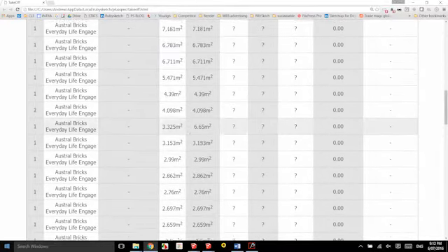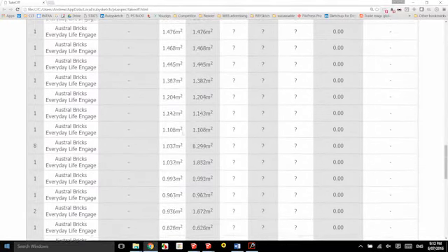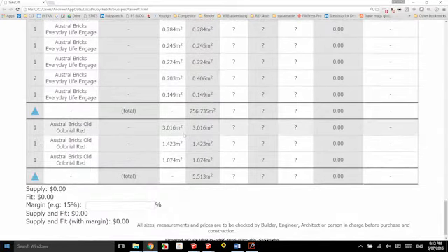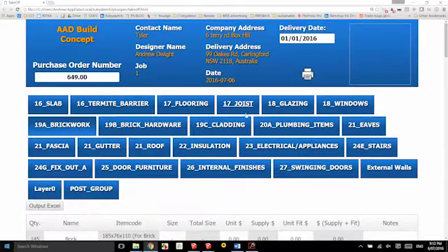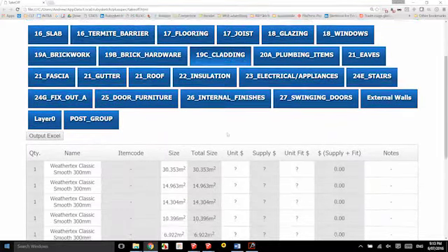So for instance, you can only buy bricks in packs of 80, I'm not sure if you're aware. So if you had to buy 81 bricks, it'll spit out 160 bricks. And we did that from what the manufacturer specifies. If you're in Victoria, they don't sell the same bricks in Victoria as they sell in New South Wales. So you can go into them, maybe if you can show that, Grant.